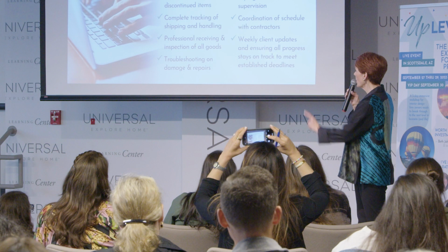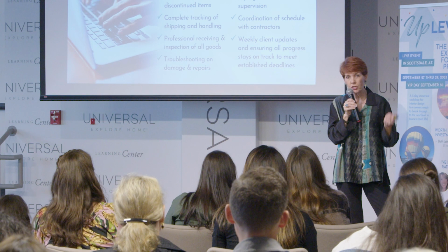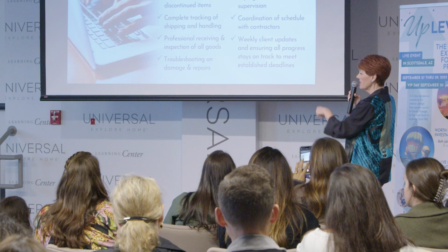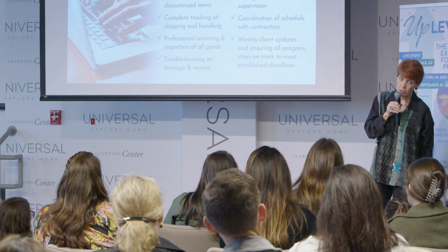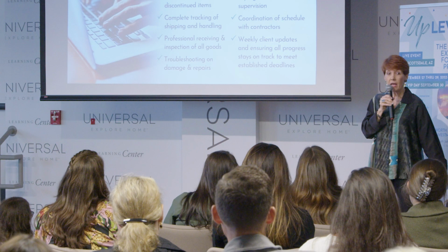So if your client pushes back on what they perceive to be a markup, first of all, you have to put the word management in there. Now, you can call it a purchasing management fee, procurement management fee, product management fee, but that word management has to be in there. It's critically important. I like to take this list and number them, and I like to include what I don't have on top of there, which is generate the purchase orders. Because that's kind of a pain in the behind, don't you think? So you have 10 elements here, I think. I can't count this morning. Maybe 9. 10 if I add that in there. And that's a nice long list of things that they can't do.